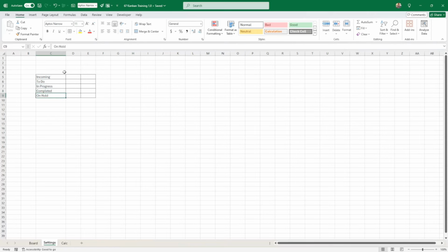Now this is Agile, whatever type of task board that you want to have. If you're really into the Agile business, you could put stories here instead of to-dos. Stories are a way to get into tasks later on. But I like incoming, because you know that something is coming, you hear about it, and then you can do some planning around it. It's not ready to start yet. What is ready to start will go in a to-do zone. But you know it's there, so you might as well plan around it if you have some resources and the like.